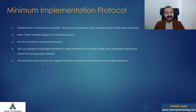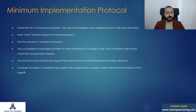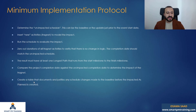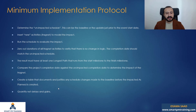The result must have at least one longest path that runs from start to finish. Compare the project completion date you have just achieved against the unimpacted completion date to determine the impact of the fragment. Then we can create a table that documents and justifies any schedule changes made to the baseline before the impacted as-planned is created. We quantify net delays and gains.